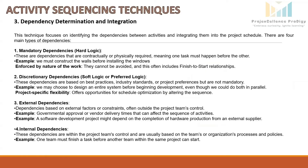Next is Dependency Determination and Integration. This technique focuses on identifying the dependencies between activities and integrating them into the project schedule. There are four main types. The first is mandatory dependencies, also called hard logic — these are inherent in the nature of the work and represent activities that must be done in a specific order due to physical or technical constraints, such as constructing walls before installing windows. These cannot be avoided and often include a Finish to Start relationship.